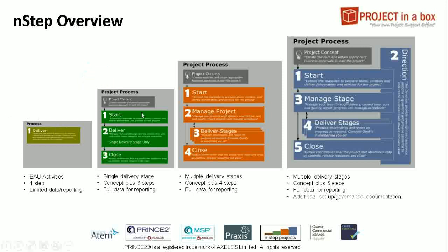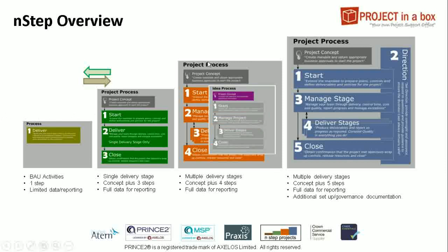Then the next point is that we've got the 4-step, which, as I mentioned, is by far the most popular approach. When you're in multi-user, you can have 4-step straight, where you immediately come into the whole methodology being open, or you can have 4-step demand. When you run a 4-step demand type project, what you first get is just the concept phase.